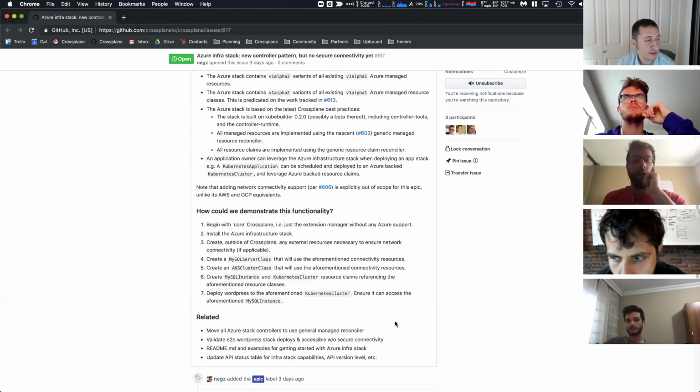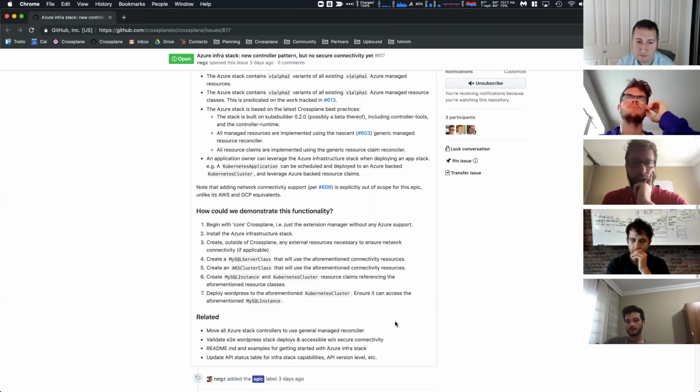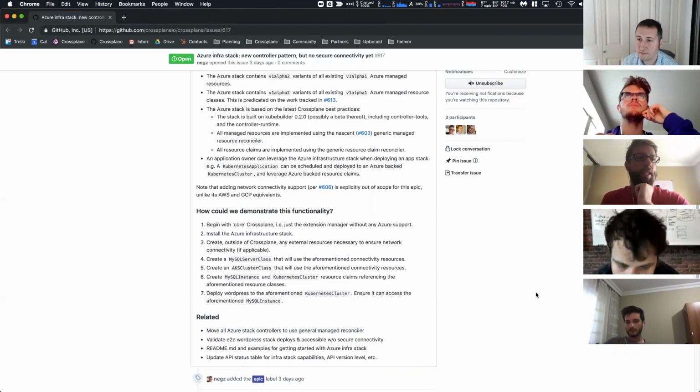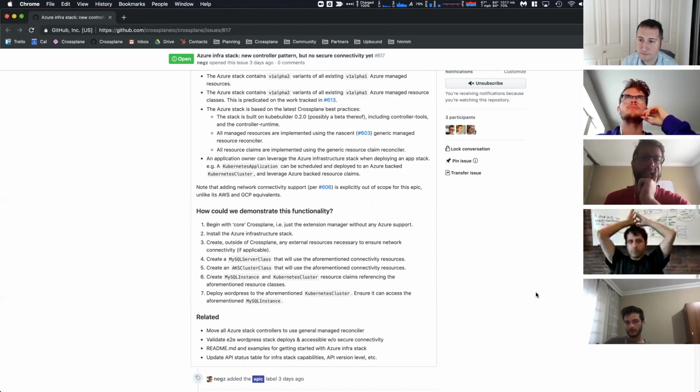Oh yeah, I think a big driver here too. When we're planning this milestone and looking at all the work that we needed to do, there was a whole bunch of stuff there. So we were looking for places where we could scope appropriately. In Azure specifically, it made sense to scope out the connectivity stuff because GitLab doesn't really support Azure yet, so it was a lower priority than AWS and GCP were. So that's where that cut came from.